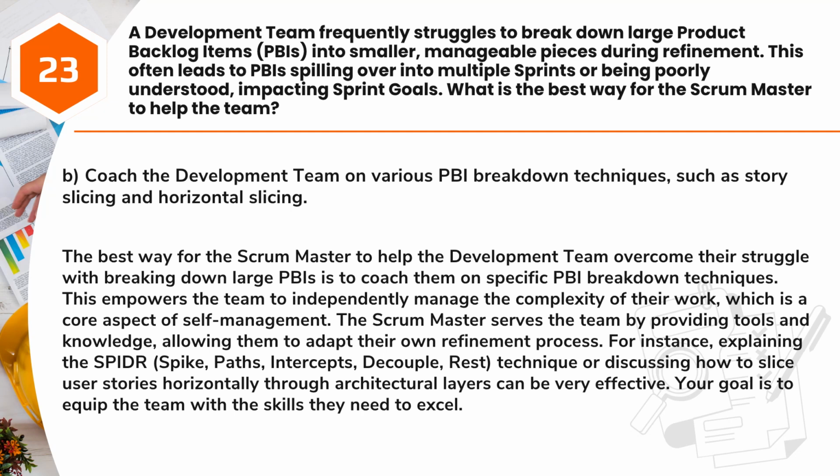For instance, explaining the SPIDR technique (spike, paths, interfaces, data, rules), or discussing how to slice user stories horizontally through architectural layers can be very effective. Your goal is to equip the team with the skills they need to excel.